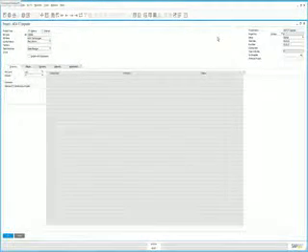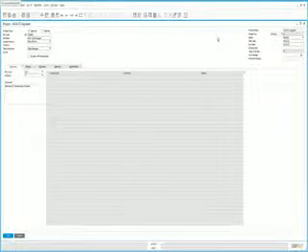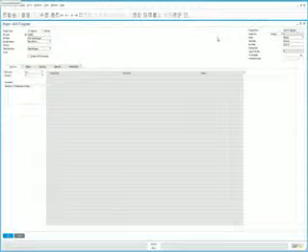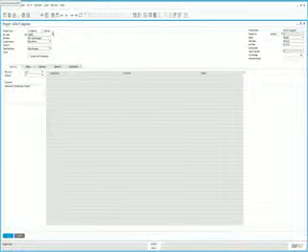Under the Project Management module, we are going to open up a project for our customer, ADA Technologies. This project involves the upgrade of their IT infrastructure, including servers, fiber optics, printers, and also personal computers. On the header level, we can see that we've defined this project as an external project. You can also create internal projects. We've identified a project name, the start date and due date, and also a project lead, for example, the sales employee that's going to be managing the project.